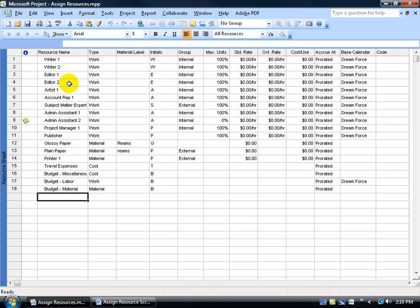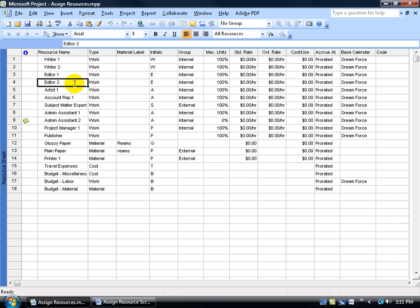Second, accurate scheduling. We want to go off the resources calendar and their availability. As you recall, the resource calendar takes precedence over the project calendar. So if one of our resources can only work on weekends when the project's only scheduled to work Monday through Fridays, then we want to make sure that we set the schedule up, and of course it overwrites the project schedule, and the project allows that resource to work on weekends.